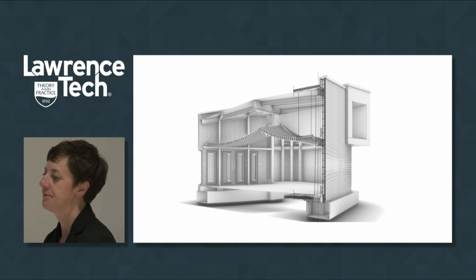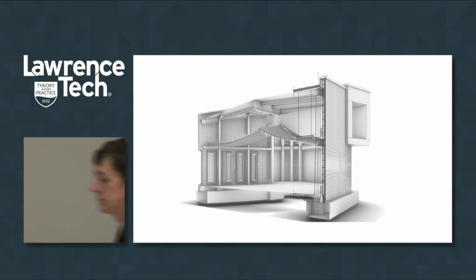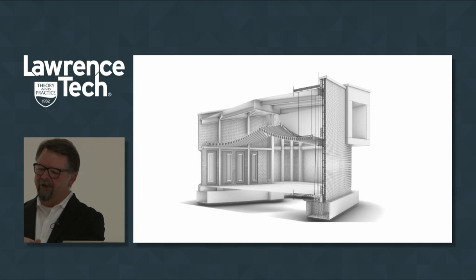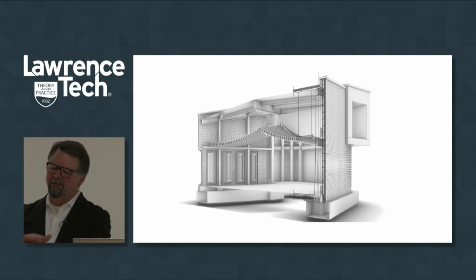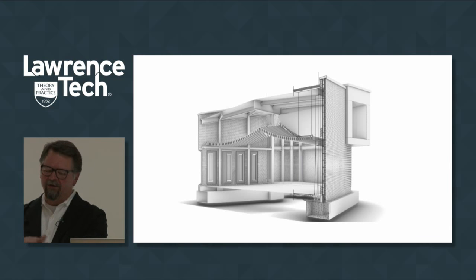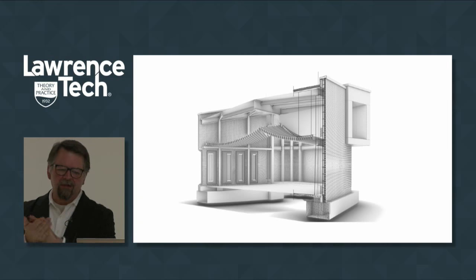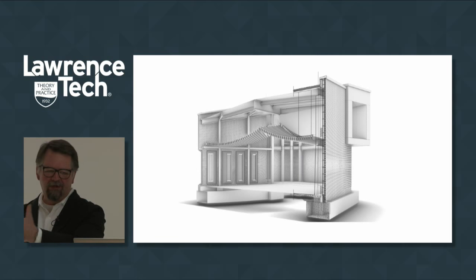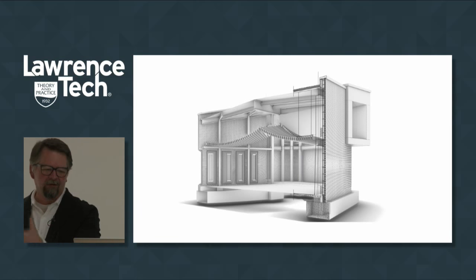So there are three drawings in that image. One is the Rhino model of our project, our Rhino model. There's a model that's imported from the steel fabricator, Douglas, who are just outside of Lansing. And then there's a CAD drawing of our wall section, all matching up to make sure that there's precision and alignment of all of those pieces. Because the last thing we wanted to do was get that frame up and then start bricking, and that piece of steel is a little bit too far out, and now we've got a whole other thing to worry about.